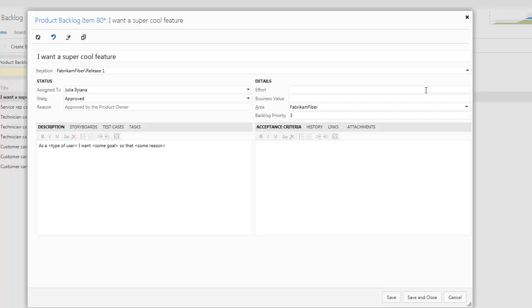And there's this field that's called effort. Now, in the Scrum methodology, the effort field can be defined in points. It can be defined in hours, days, whatever you want, as long as it's relative to the other work items. And the effort field defines the complexity of that task or that user story. So the higher the number is, the more complex it is.